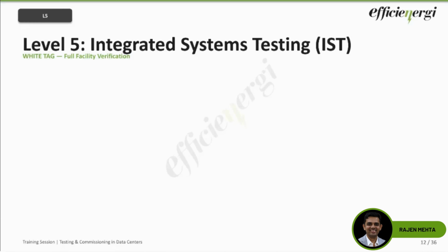Now, what makes IST different? L4 tested individual systems, whereas in IST all the systems are working together under severe stress. We create facility-wide failure scenarios here, as opposed to the system-wide failure scenarios that we were doing in the L4 stage.